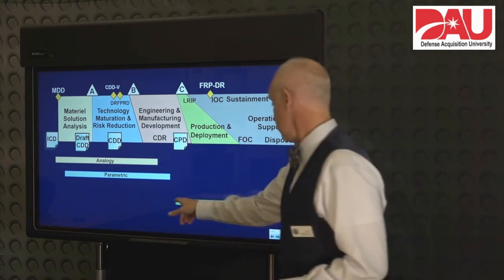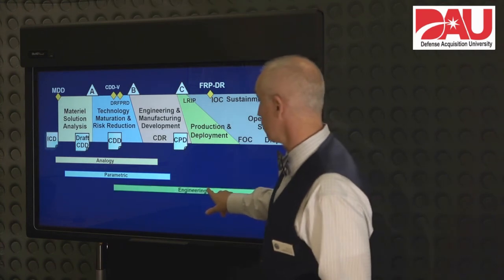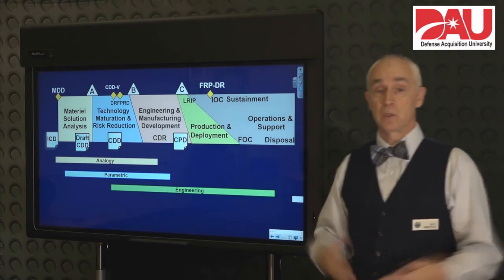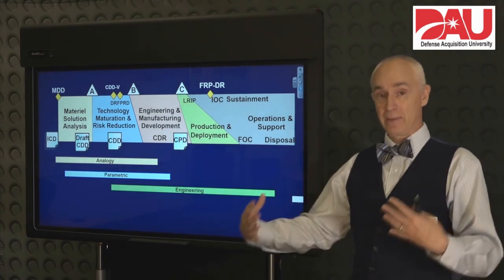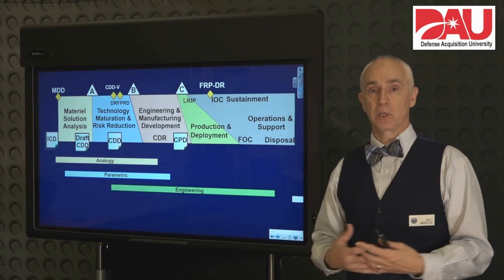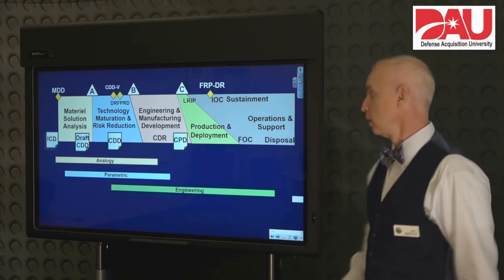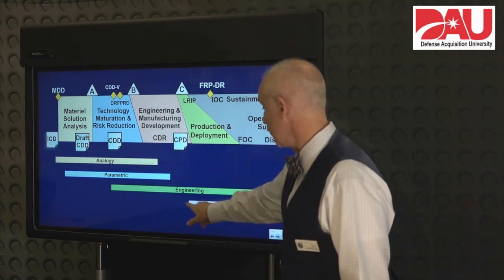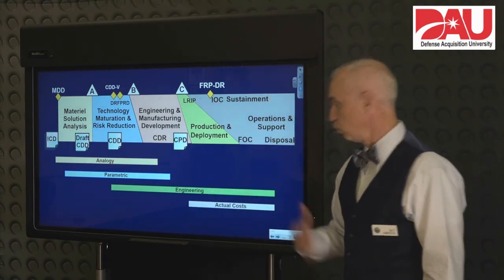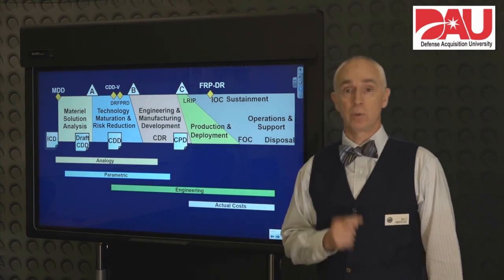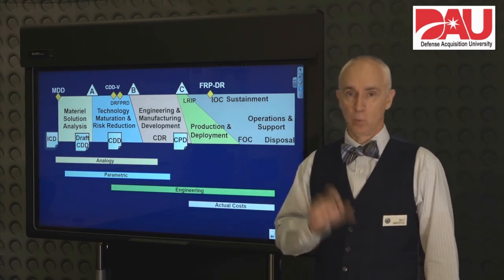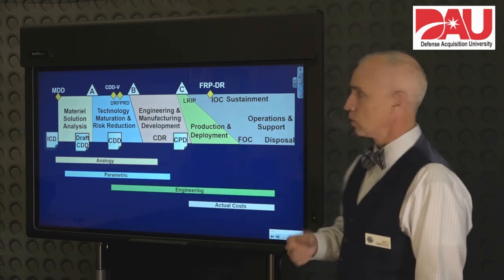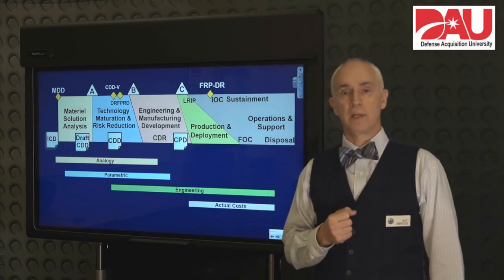The engineering method is good pretty much from the time you start designing throughout the rest of the life cycle, then, because you can use the design then to get a cost estimate for how much it costs, because that's that bottom up piece part estimate. And then lastly, once you start into production, you can look at the actual costs of what you're getting, and that can provide you with good accurate information on what the further production down the line is going to cost you.